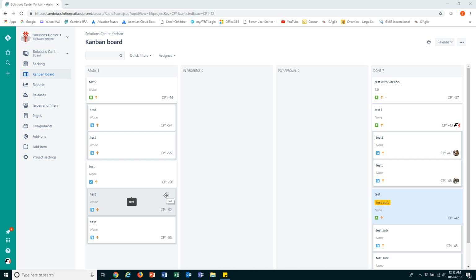All right, so one of the pieces of feedback that I got was the inability to assign a story to multiple people. Without some really kind of screwy configuration, there really isn't any way to do it. And this is done very purposely by Jira. Jira has a lot of built-in reports, and a lot of those built-in reports are based on assignee. And if you have multiple assignees, it just simply will break those reports. So Jira does not allow for any story to have multiple assignees.